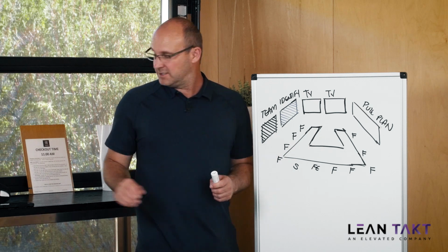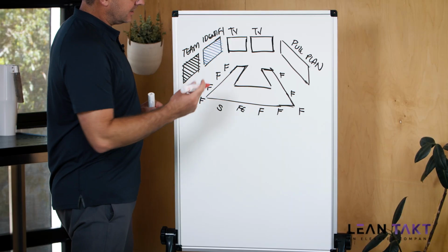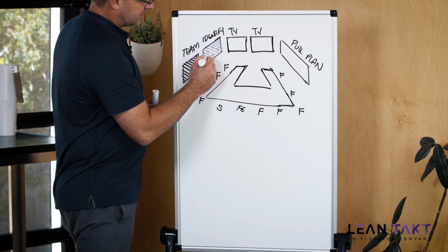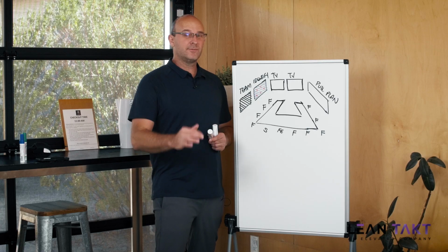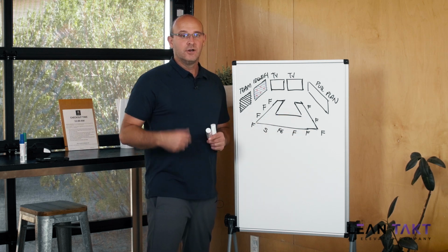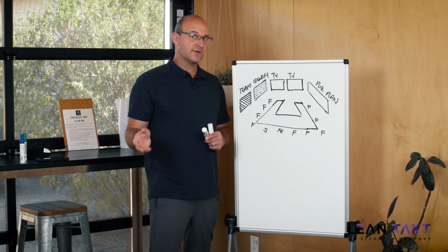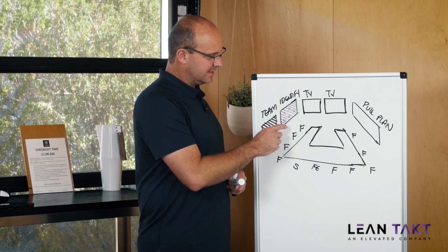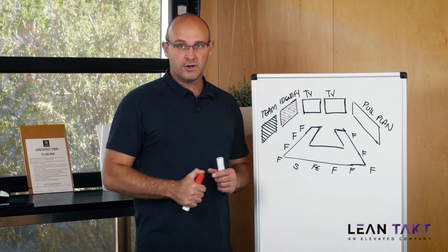Before the trade partners ever start the meeting, and this is the genius part, they can literally come in here, and the purpose of this is for the trade partners to mark down any constraints and roadblocks on that board even before the meeting starts. That way you don't have to go around one by one and say, what do you need? What do you need? All of the talking, transferring, and mental context just wastes a lot of time. Your foreman can list on the boards visually in red marker what are the problems.